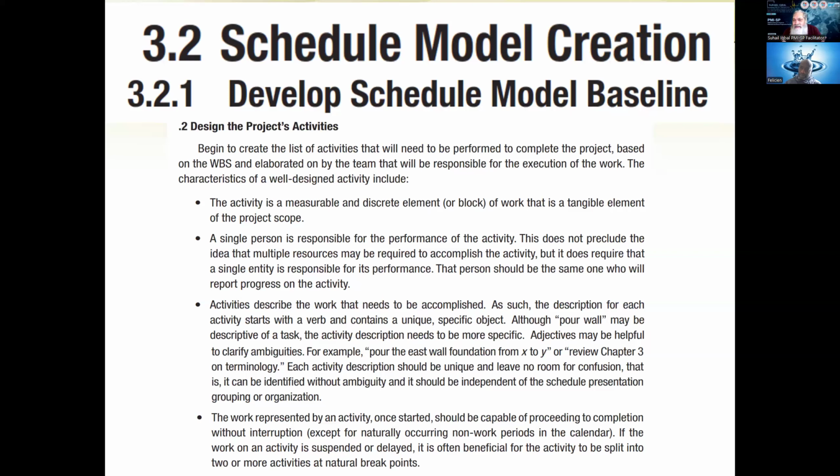We'll do something like that. No, no, no. Let's be exact about what you want to do. Every activity must be very clear, with a lot of clarity in the statement, clearly saying what to do, right? And whatever is being done in that activity must be able to be measured discretely, so that we can say that this work is this much complete and this much is not complete.